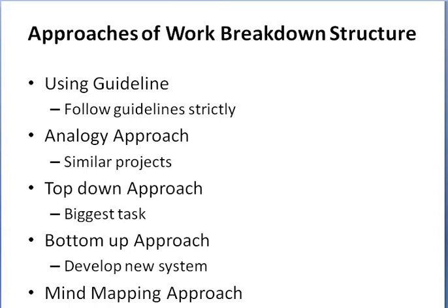Okay. So definitely there is not a natural flow, since the team has to come up with a solution and then categorize it under a main component. So basically it consumes more time than the top-down approach, since the team has to commence the brainstorming sessions and finally divide all the identified tasks under major components.